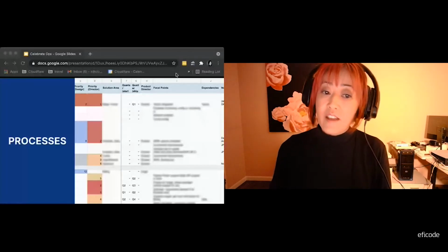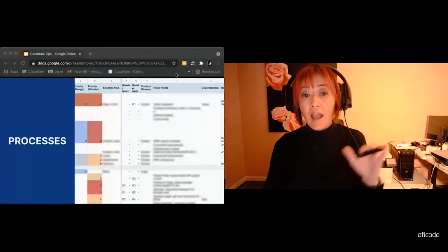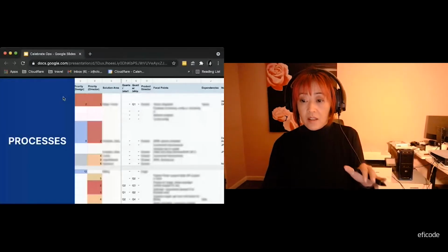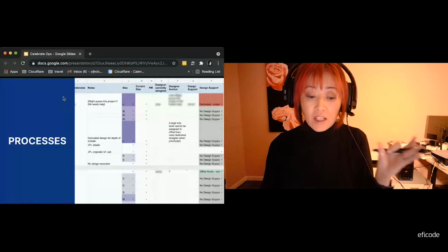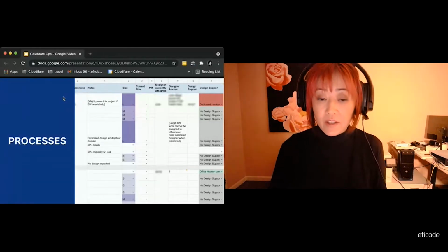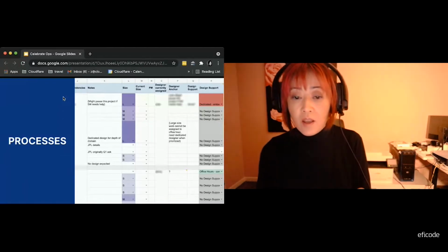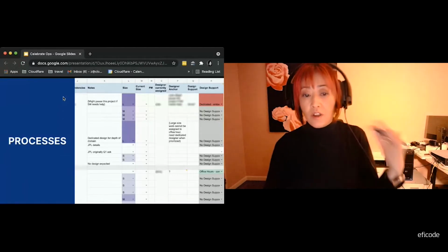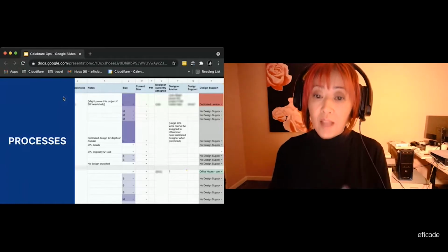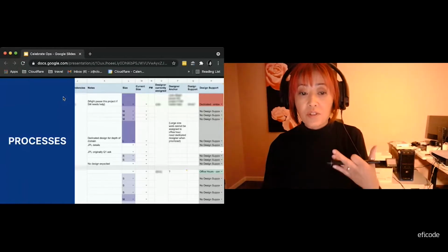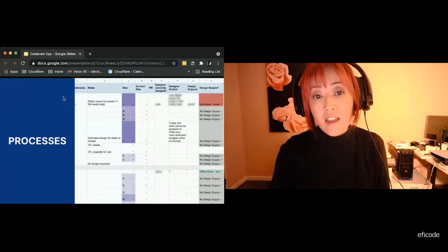In return, our designers are no longer reacting to tickets, requests, putting out fires. Instead, they're working on high priority, high impact work. The next step is really scoping and sizing all these products correctly. In the past, because we didn't have enough designers or enough time, we tended to only estimate work based on the UI and the ship. But as Yoho and Sammy talked about earlier, it's really important to involve design in the earlier strategy planning stage of the delivery, right? So we need to take into consideration time for exploration, ideation, iteration, and the execution.